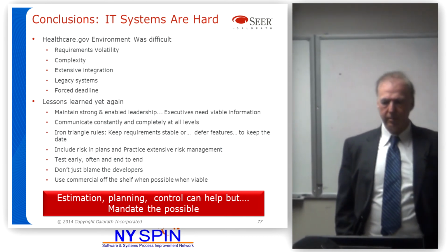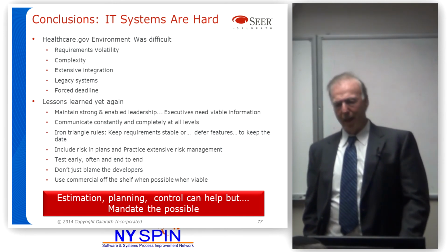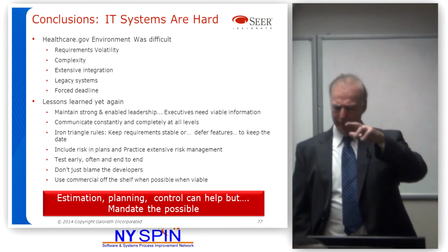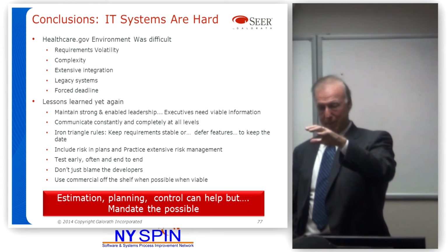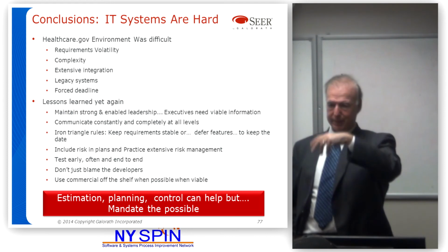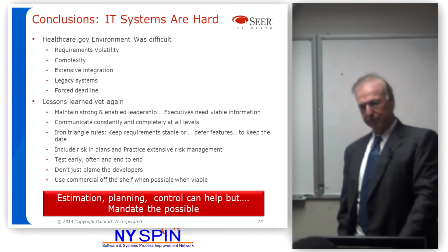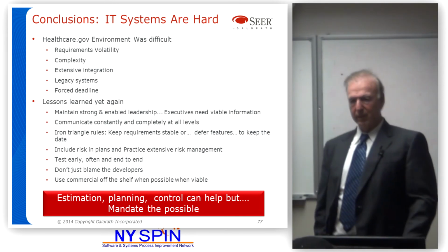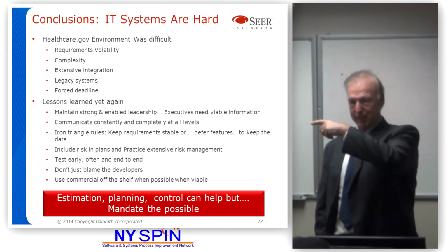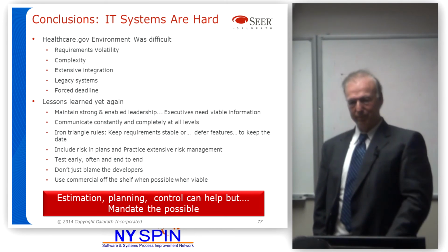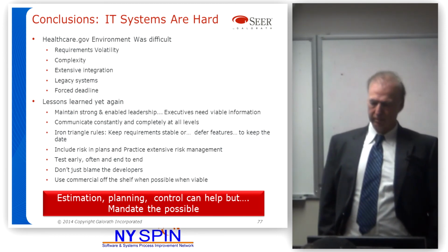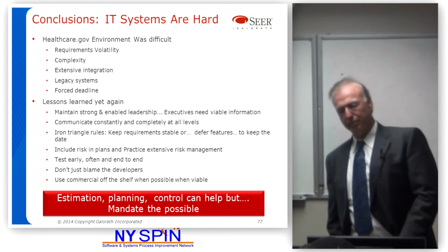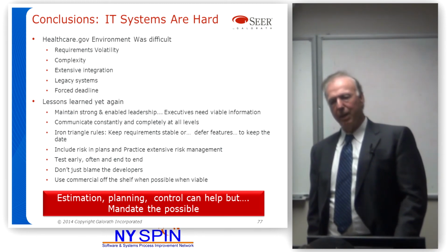I just want to know if you had come across that, or if that was a part of your overall analysis. Yeah, absolutely. By my definition, matrix just means somebody has a different boss but is assigned to that program. I think you're saying they're not full-time equivalents. They're part-time people, which is another whole risk in Agile models. They might be assigned at 25%. In a lot of cases, the estimated or actual due dates go up because every time that person comes back on the project, they need another day to get back into the programming, so you lose a day every time they come back in. I was wondering if you've ever come across that situation.